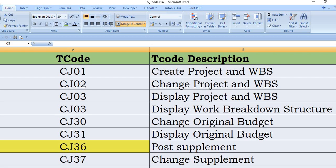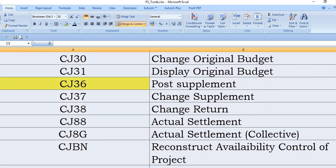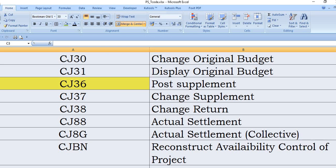CJ31 is display original budget. CJ36 for any supplement, CJ37 is change supplement, CJ38 is change return. CJ88 is very important, this is used for actual settlement, means user needs to transfer the cost from the network element to PS cleaning GL.